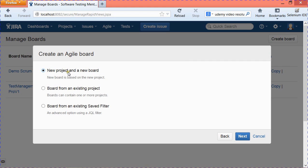It will ask you to create either a new project and a new board, or a board from an existing project. If you already have an existing project and want to create a scrum board for it, select the second option. If you have created an advanced JQL filter and want to create a scrum board from that filter, choose the third option. We'll create a new project and a new board, so select the first option and click Next.